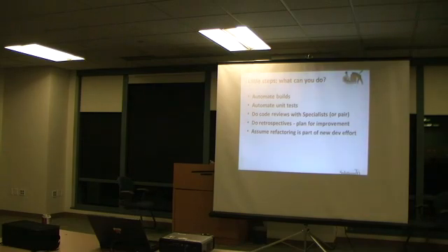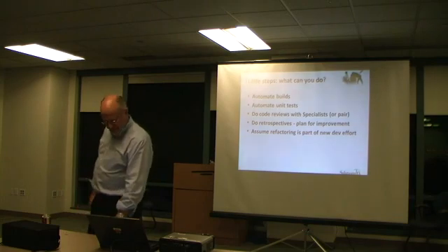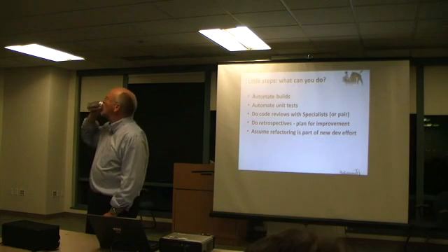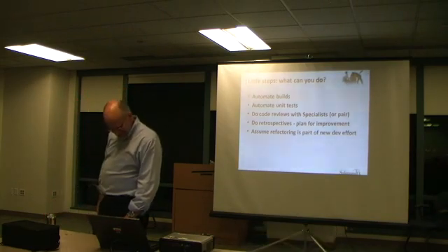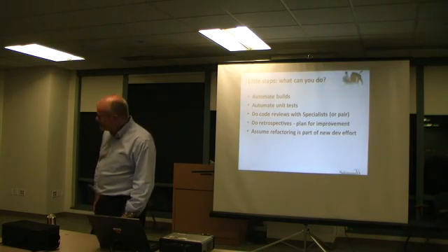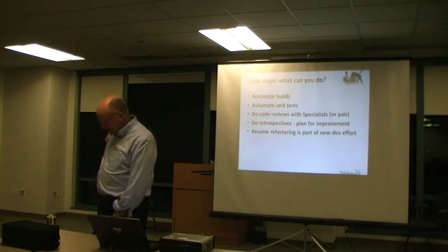It's one of the problems that comes out of the Scrum stuff, to me, because you don't have that policy. You're working on the more old-fashioned model. Actually, the original Scrum book has a recommendation for how to answer that very question. In fact, I think they have a whole chapter dedicated to it. And the answer is that you define your sprint cycles based off of your release cycle. So if you're going to do a release every 6 months, you set up your sprints so they align.